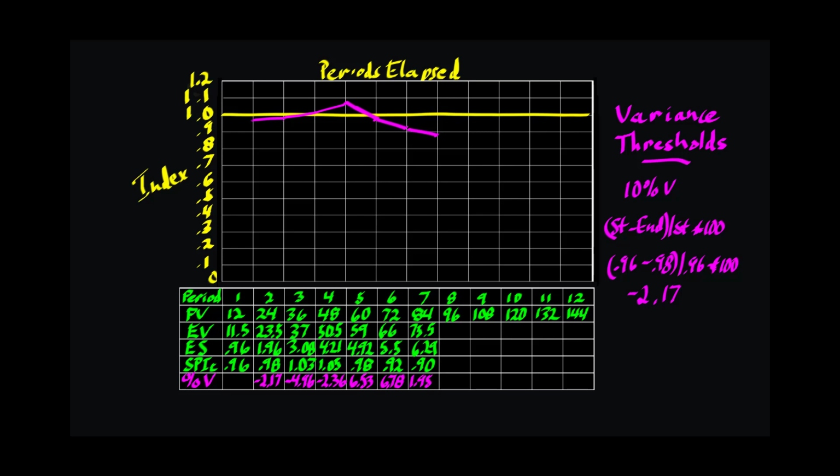As you can see, every period-to-period variance here is within the 10% threshold, but analysis is not yet done. When there are 3 or more observations, all headed in the same direction, you have a trend. For a trend, you need to analyze not only each period's variance, but the overall variance.